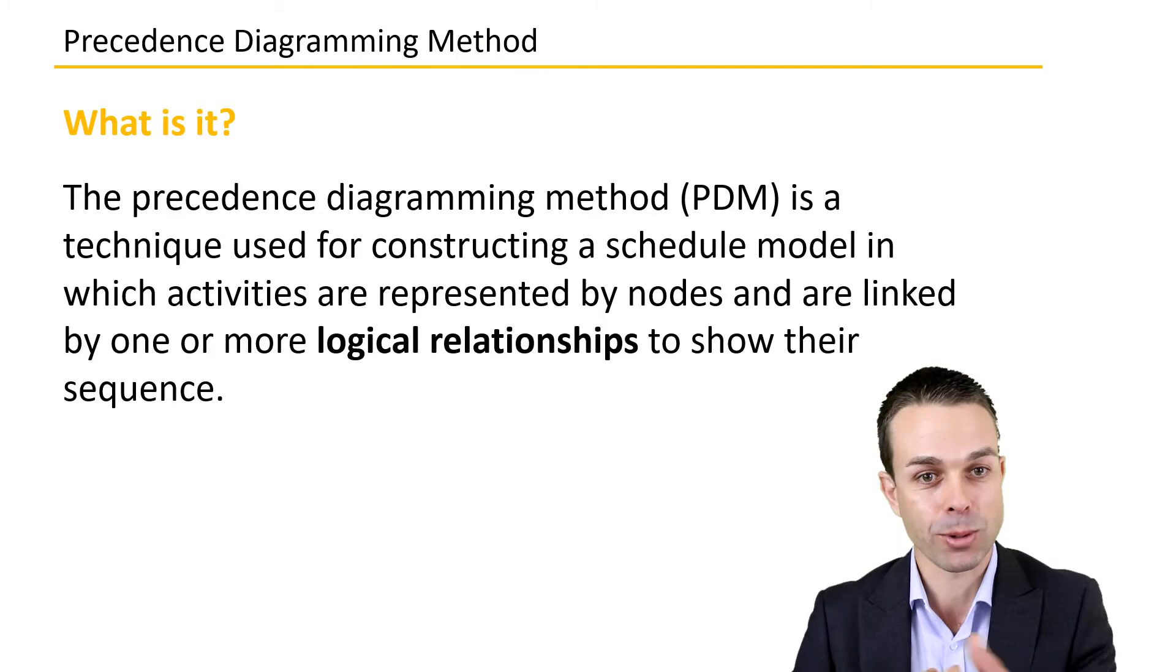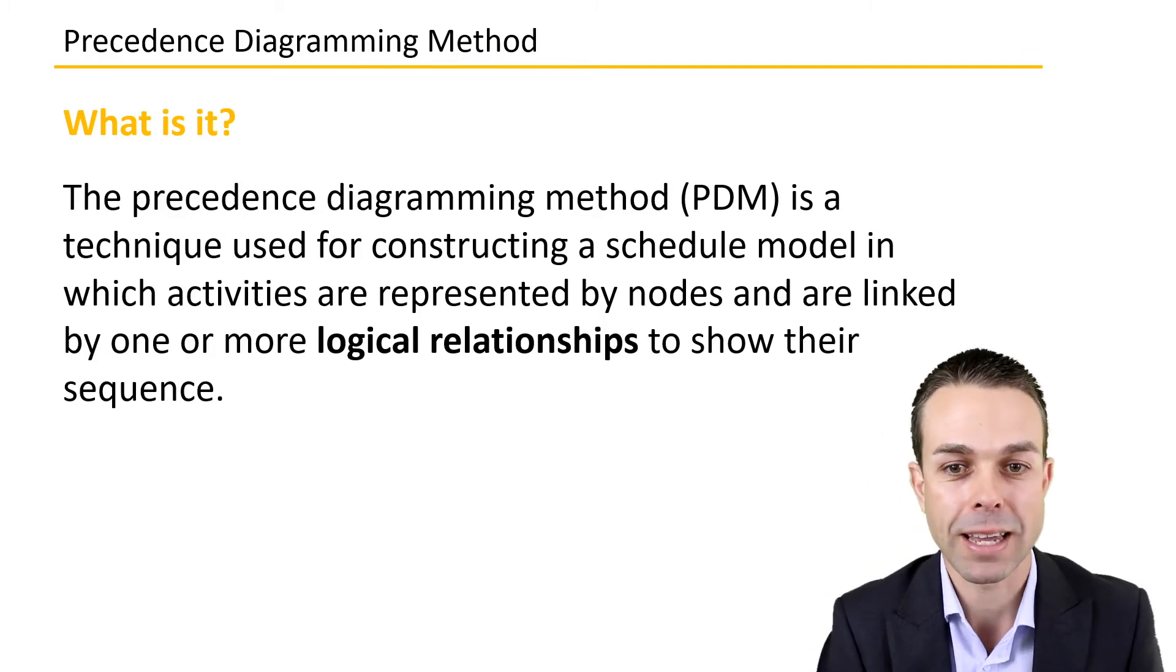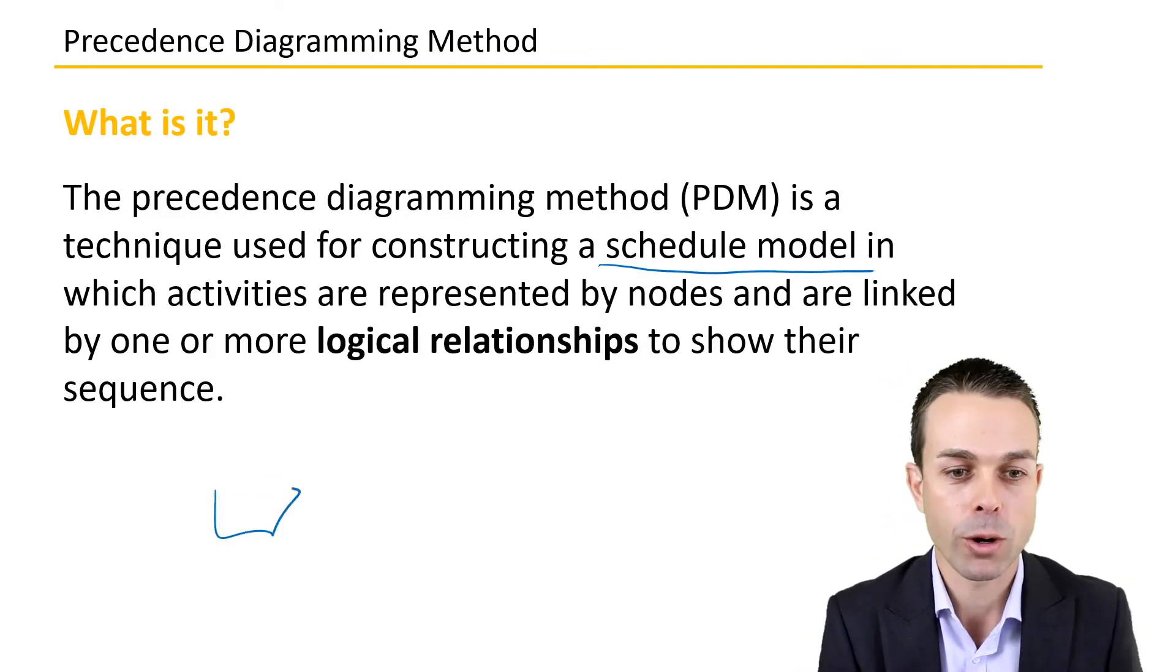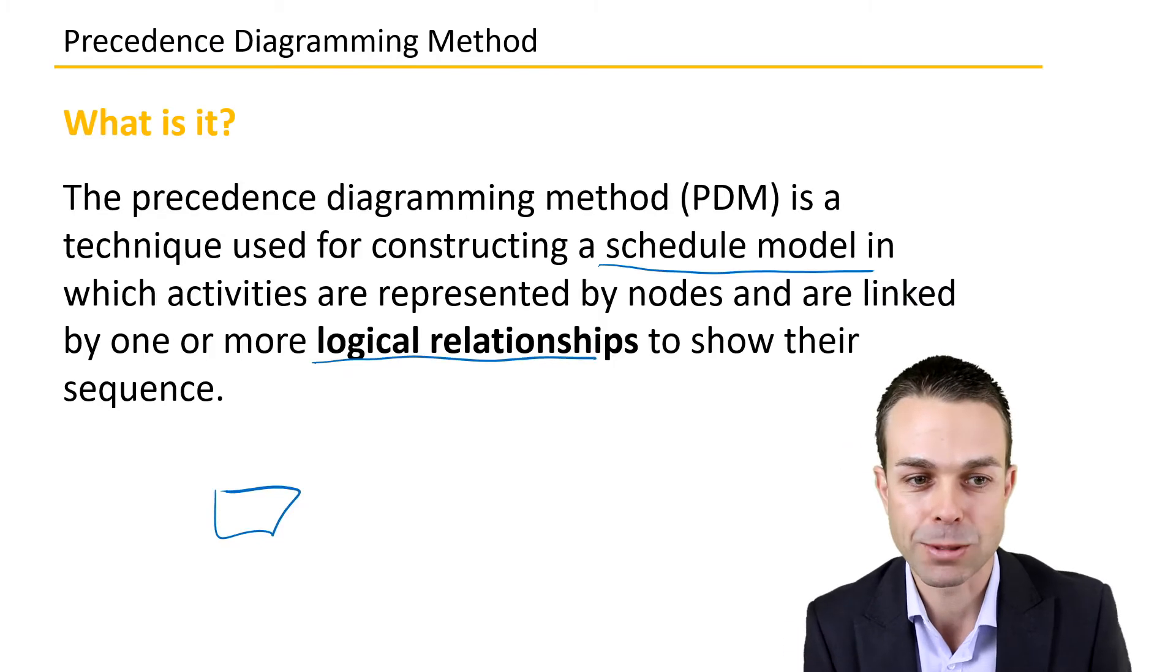What is the Precedence Diagramming Method? It's a technique used for constructing a schedule model in which activities, represented by nodes, are linked by one or more logical relationships to show their sequence.